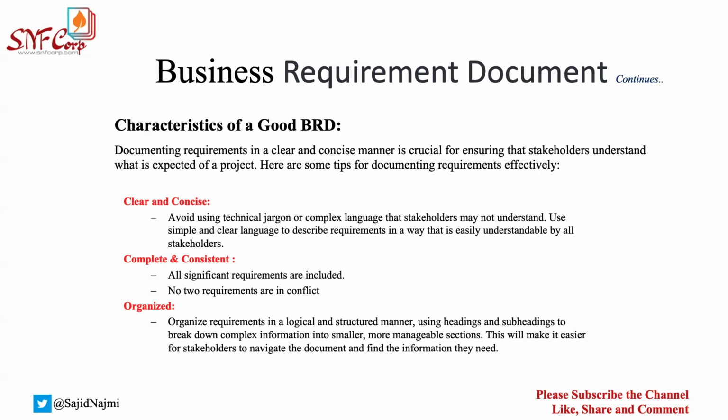It has to be complete and consistent. You want to make sure you're writing all possible requirements. Everything is included. You don't want to miss anything, otherwise you will be in trouble during the UAT. Sometimes business doesn't give you the whole requirement. Based on your research, your analysis, and your discussion with business and the team, you come up with things and inform business, hey, I think you also need this. And then business adds those things to the requirement. So as long as it is not signed off and you're in the process of writing this documentation, you may always change things. Once it is signed off and baselined, you will not. So make sure it is complete and consistent.